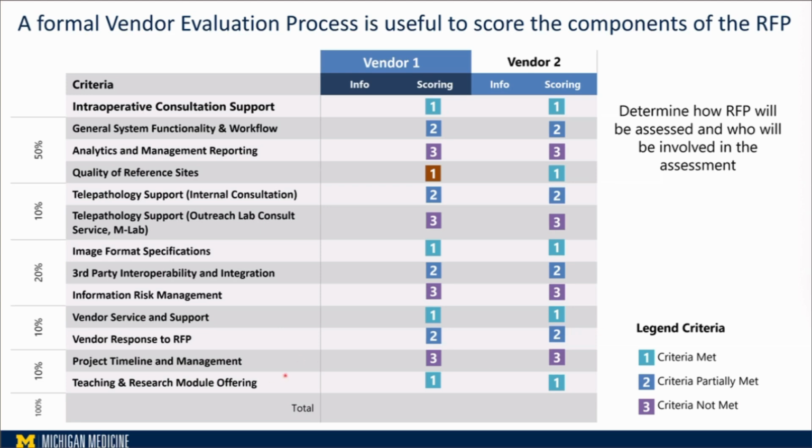Things that you really, really need to write into the contract. For example, the things that we put into the contract from our end, we said we cannot work with any vendor that is not going to provide a standard format, for example, DICOM format in pathology. Even if you don't have DICOM format at this moment, maybe we can work together with you, and give us a timeline for when this format is going to be available in your system.